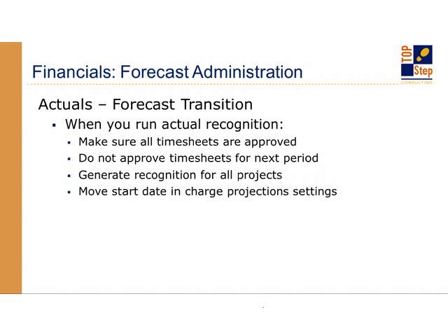You also want to be careful to not approve time for the next period. So if it's month end, somebody's entered a time sheet maybe in advance, maybe by mistake, who knows. Be careful not to approve that because that will update the percent complete for a time period it really shouldn't. And you want to go ahead and generate your recognition. And I say for all projects because you want to make sure that your reports are complete. If you're looking at actuals, you want to make sure that's all actuals and not just some actuals.